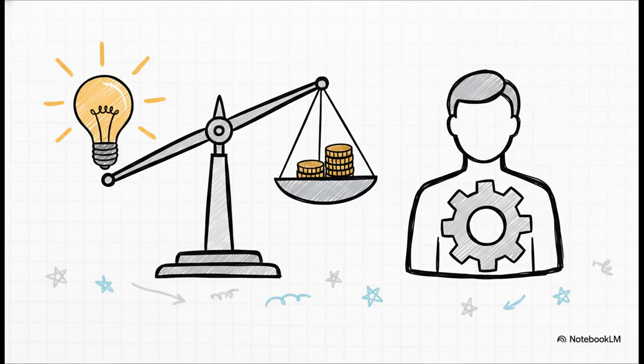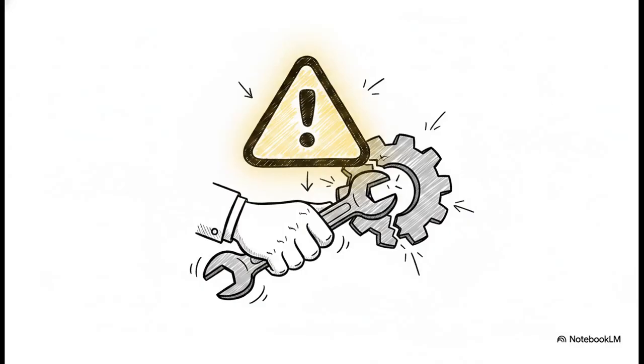It's that simple. And let's look at the final 3 rules. Your systems should point out exceptions, fit the existing organizational culture, and trigger corrective action. That last one is the real kicker. Control is completely unjustified unless those deviations from your plans are actively corrected by the right authority. I mean, spotting a problem is completely useless if no one is actually empowered to go in and fix it.